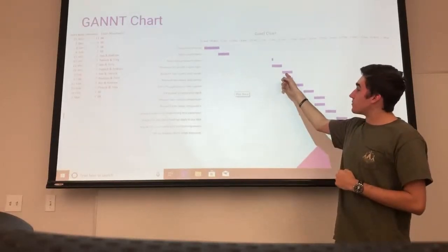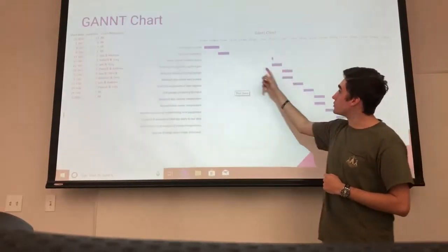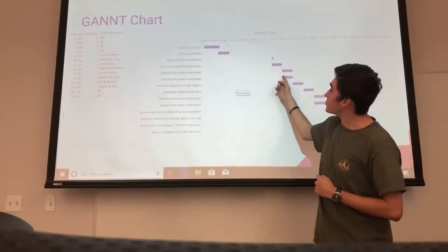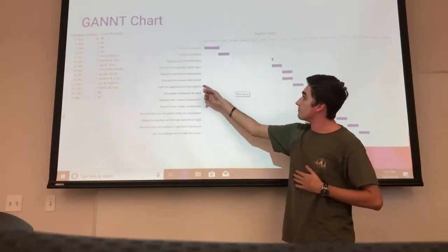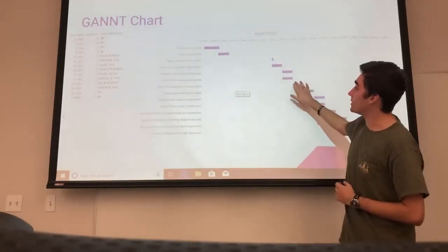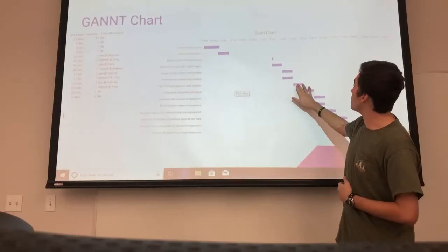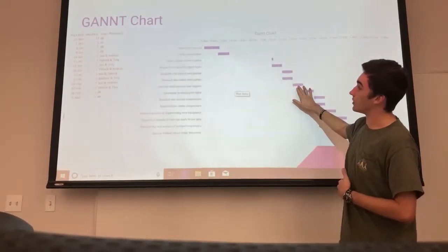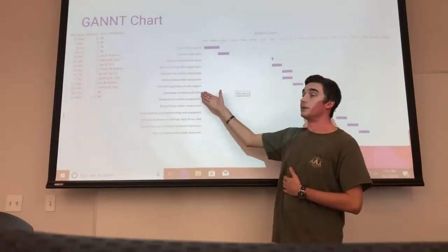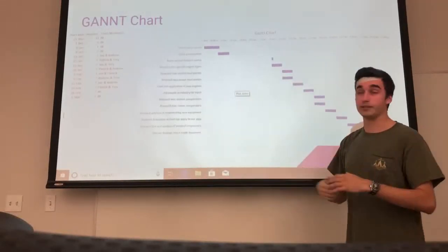And on the 15th of January, John and Andrew will work for 7 days on researching into current mud pumps. And then at the same time, Patrick and Trey will be researching into newer mud pumps. And right after that 7-day period, we'll be looking into the application of new engines. And who will be working on that is John and Trey. And then a week after that, Patrick and Andrew will be asking people in the industry for input onto our senior design project.